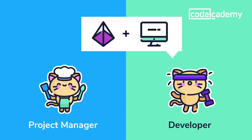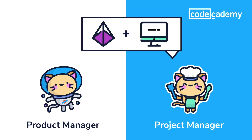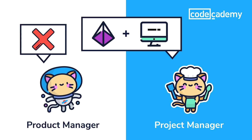It might not be the ideal solution, but we can build and iterate off it. Once a project manager understands the challenge, they have to see if they can get the developers the resources they need to accomplish it. If there aren't enough developers to work on this feature, they might have to approach the product manager for pushback. Being able to select from a dropdown a specific vet is a great idea, but it's going to take a long time. So the project manager relays this feedback to the product manager, who deems the ability to select a specific veterinarian non-critical to launch.